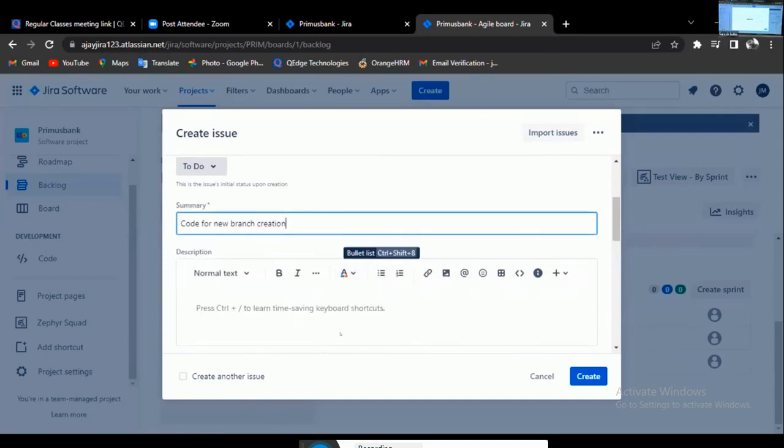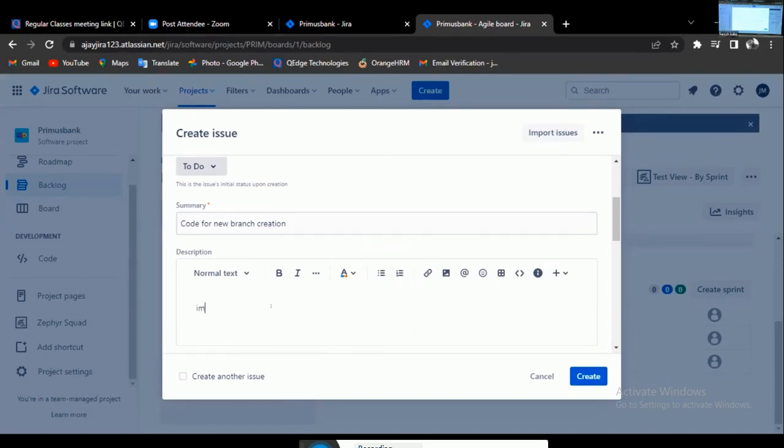You have to give a more detailed description to the developer. Write in this way: implement or develop UI, user interface. For whom does the Scrum Master assign this work? Developer. Listen everybody. In the Agile Scrum model, we don't follow much documentation. We are not planning hundreds of requirements in one schedule, maximum 2-3 requirements. If I give more details to my developers and testers, very quickly what happens? Otherwise, I need to clarify their doubts.